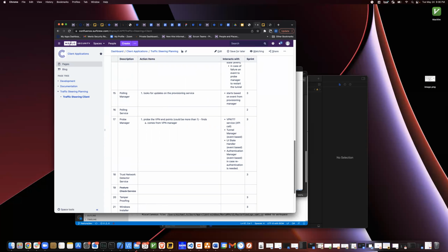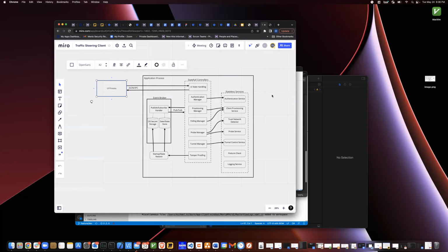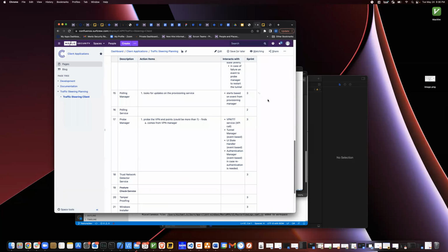The concept is to break everything down into these pieces, and then from each one of those pieces, you have epics and user stories, and then we want to plan the order and in which particular sprint these things are going to be done.